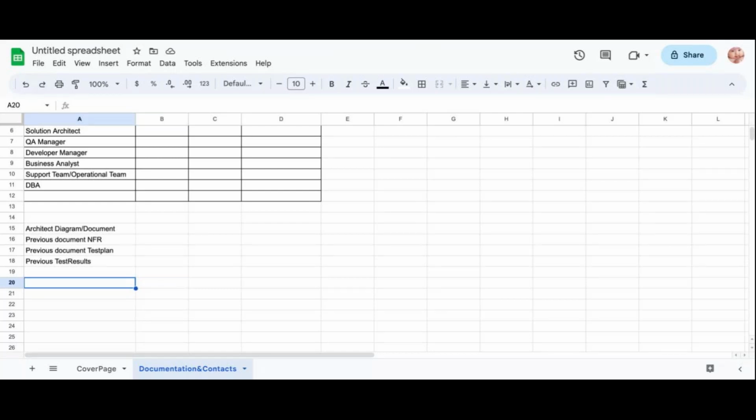Then only you can decide whether the application is good or not. Today you are giving an NFR, they will fill it, and tomorrow you can't do an execution. This is not like manual testing. You need some time to do scripting, right? So you need some time, so you have to ask when they are expecting the first test.